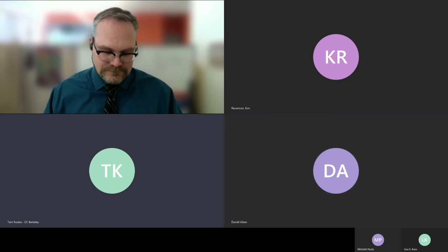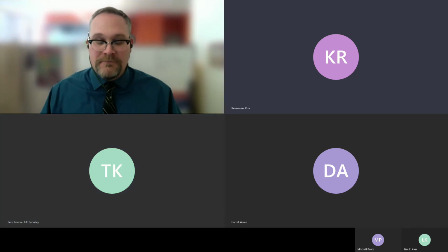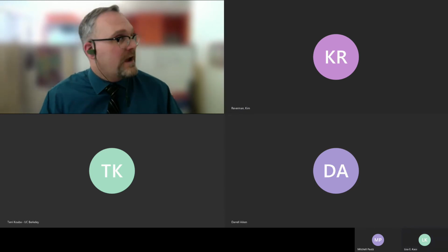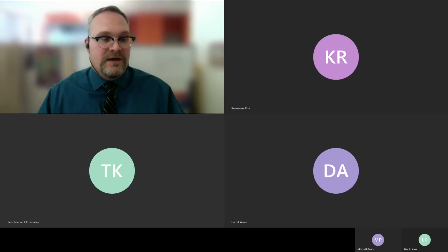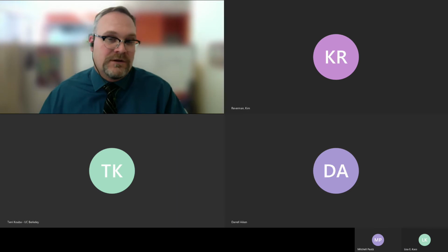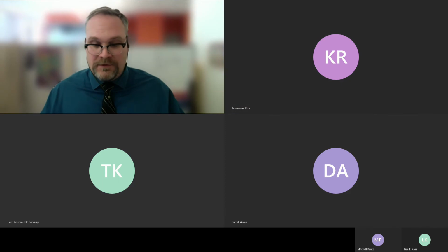Right. So you're doing all the work to input all the data, but then not looking at the data to ask what it is telling us. We do that a lot at Cal. Yeah, it's great to do the resource allocation, and we're also collecting time cards to see what people are charging. But there's no double-checking to say, hey, are we always asking for 5 hours for this task and it really only takes an hour? Now we're over allocating and not actually fulfilling that time. That's why we're showing as over allocated: it took 1 hour, but then we're spending the 4 hours on another task.